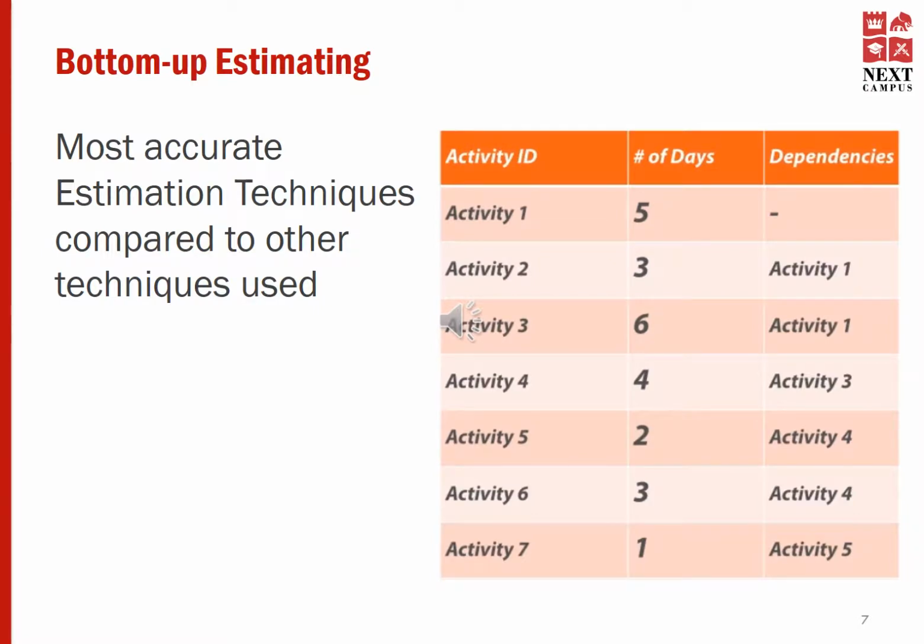Because of these factors, work packages are an effective tool for clearly explaining to the team member that any changes to the work package are going to reopen the estimation process. In that sense, it gives them protection from scope changes on their task. That is why the work package documents the deliverables, the risks and the approach to the task. You record the team member's estimates and you both sign the document. This removes a lot of anxiety from many team members who have previously been burned by the estimation process.